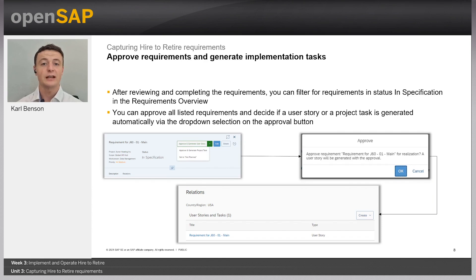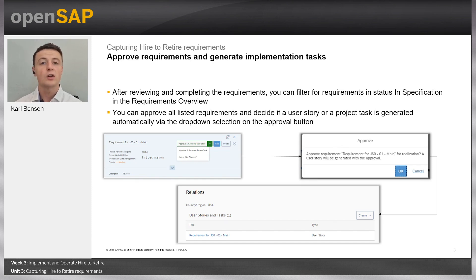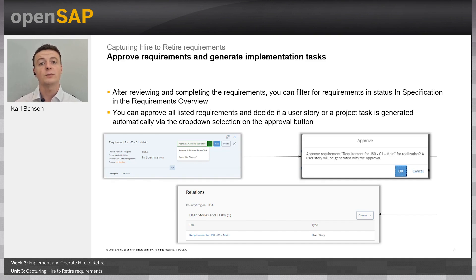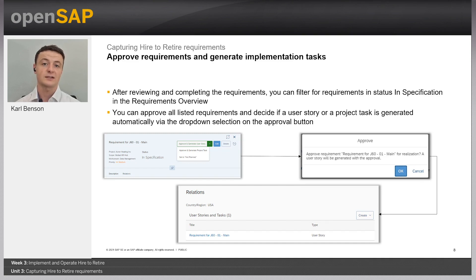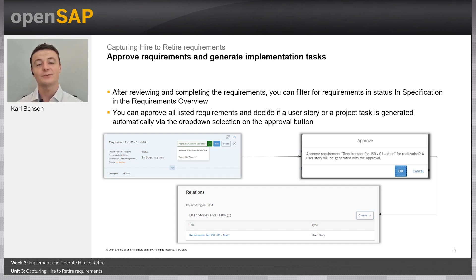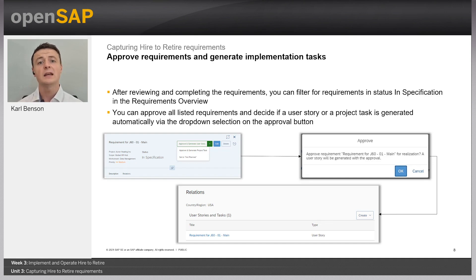When approving a requirement, we can either generate a user story or a project task. Depending on the project, you may take the agile route using a user story, or generate a singular project task. Once approved, requirements are actionable and the generated tasks are used to fulfill them. After choosing user story or project task and confirming, a relation to it is created at the bottom of the requirement. The next step is to navigate into the user story or project task and generate sub-tasks, which are used to fulfill the requirement.